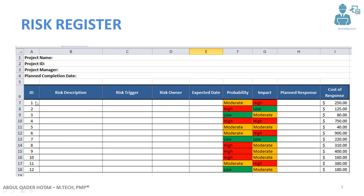Next you can see the ID of each risk — I have just used numbers, but you can use your own customized ID as you like. Risk description is where you describe what the risk is. Risk trigger refers to the first signs which appear indicating that the risk is going to happen. When you see the triggers, it means the risk is nearby and could happen any moment. Risk owner: each risk is assigned to a specific person in the project team so they can take care of that risk. Expected date is when the risk is anticipated to happen.